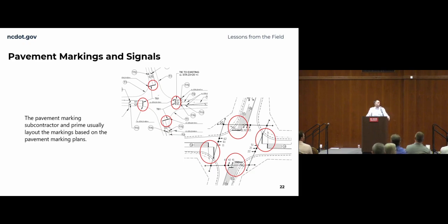But regardless, we don't want to be marring up our final lift of asphalt trying to figure out where the stop bars go. So we'd more than likely go off the signal plans, but it's also something we'd be making a phone call about with the designers or project managers just to confirm where we're supposed to be.